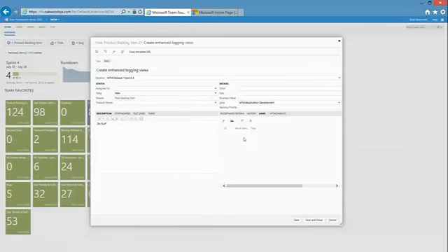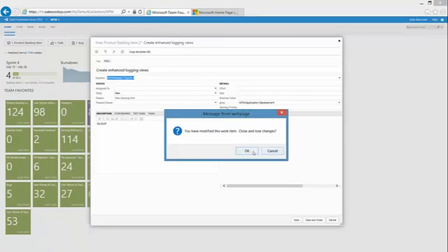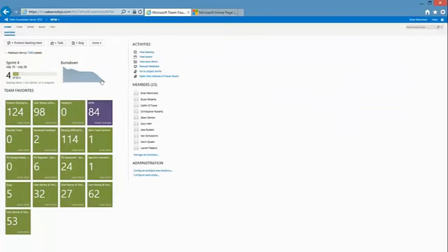And what we'll do after that is save this into our backlog. And again, I say from this screen, it actually goes right into the current iteration. And that doesn't work well for my current sprint, because as you can see, we're right at the end, and I don't want to add anything new to it and surprise my developers less than 1 hour before their sprint review.